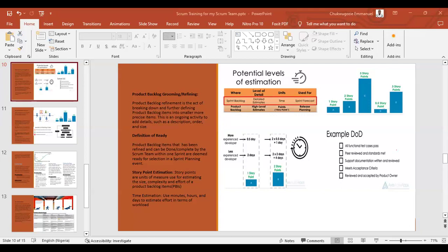But the next thing that is going to happen is what they call a subtask. For this particular user story, they will have to break it down. Let's assume you have 5 development team members in this project. These 5 may have a part to play on this user story, this foreclosure current system. But how are you going to track their workload, or how are they going to share the workload among themselves? Remember, story point is for relative estimates, telling you the complexity, the task, the risk, and everything associated with delivering this user story.